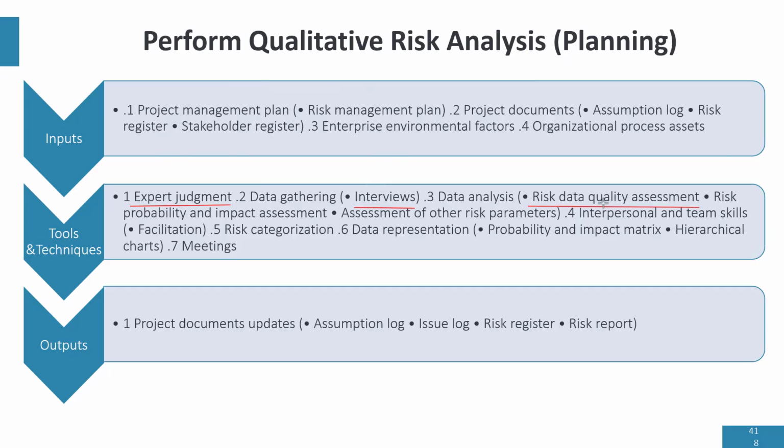If you are using a database to calculate probability, what is probability? Probability is the number of occurrences over the total number of opportunities. Let's say I want to know the probability of it raining on the 5th of April.